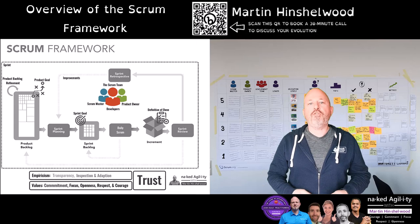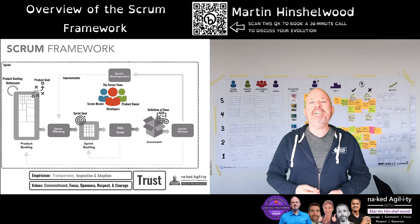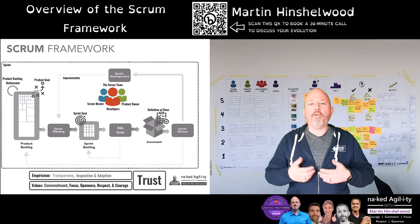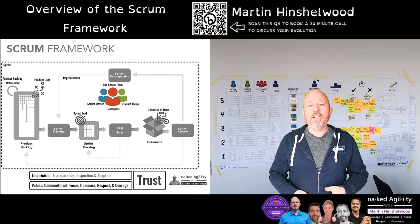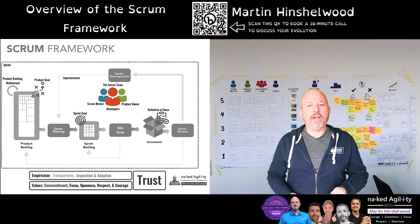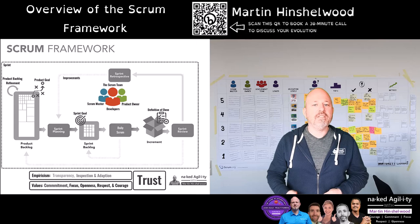The accountability of the Scrum team is to effectively create a usable working product of the highest possible value. The product owner is accountable for maximising the value of the work done by the Scrum team. Activities they might employ include developing and explicitly communicating the product goal, creating and clearly communicating product backlog items, ordering product backlog items, and ensuring that the product backlog is visible, transparent and understood.